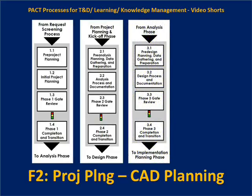In phase three, from the analysis phase through the design phase, we do our pre-design planning, data gathering, and preparation. Then we do the actual design process — we facilitate the analysis team through the creation of the design, then document it, then get ready for the gate review meeting. We review it, clean up whatever feedback we've been given, and get ready to transition into the next phase. So: prepare for it, do it, review it, clean it up, and move on.